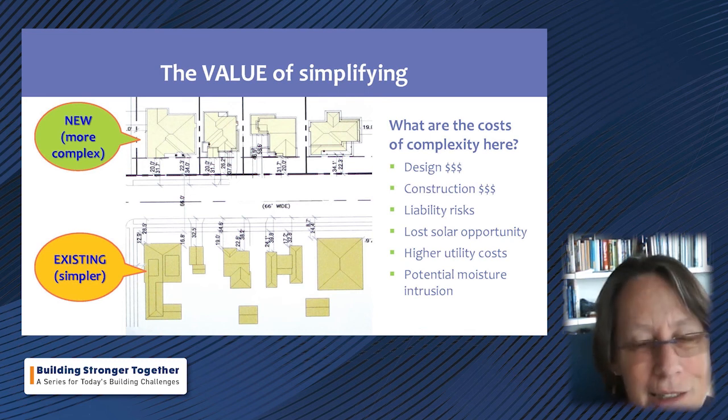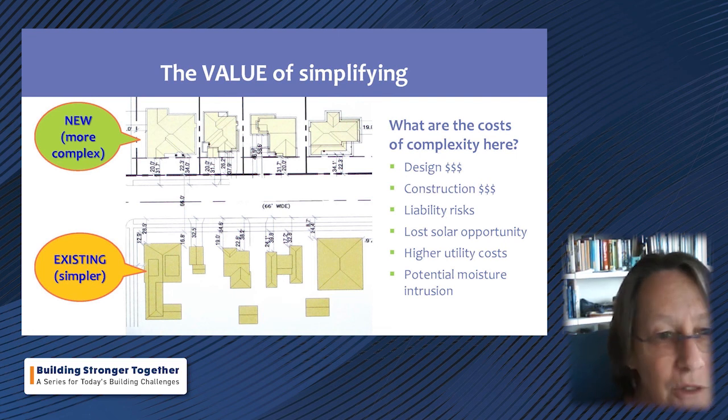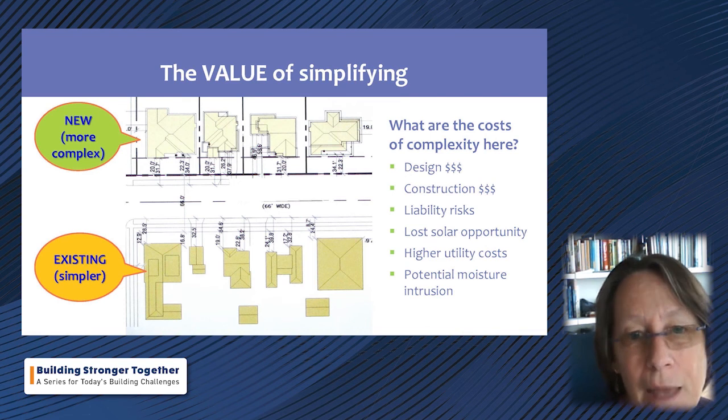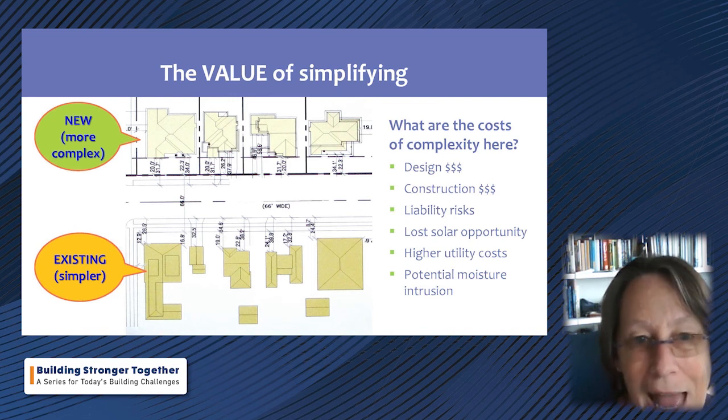I brought my checklist in to meet with the development team, which is a very experienced development team. And one of the first things I said is, have you looked at the roof? They were like, no, why? And I said, okay, take a look here. What do you see? Well, in the proposed designs, it's hugely more complex than the existing. They had done a beautiful job of emulating the look on the elevations, the facades, but they weren't really thinking about how that was translating into all these other costs.